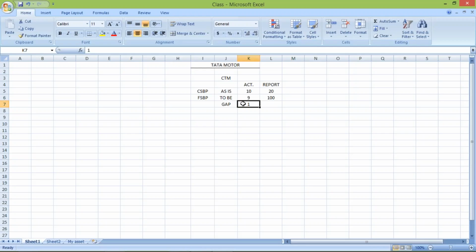Now once this informal document has been prepared, and once we have had all the negotiation and discussion with the client, whichever final outcome or final agreement there is, we are going to specify in blueprint. So in blueprint we specify all the deliverables, in the sense whatever we are going to deliver to the client, and the non-deliverables we specify under the gap list. That also will be there in the blueprint itself. And later on the client will decide whether they want the things we have specified under gap or not. At the end moment of the project they will let you know, or in between they'll have an internal meeting and discuss, and then they'll let us know whether they want these things or not.